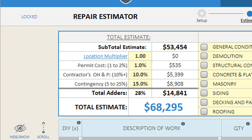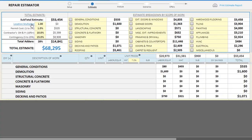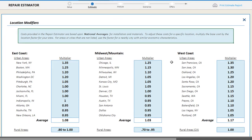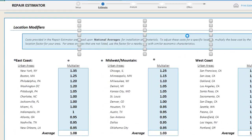The adders module includes additional cost factors for your location, building permit costs, contractor's overhead and profit, and estimating contingency. The location modifiers feature allows you to quickly adjust and modify your estimates based upon your location. The estimator includes a pre-built list of common locations and multipliers from across the country that can be used to adjust your cost estimates to fit your specific market.